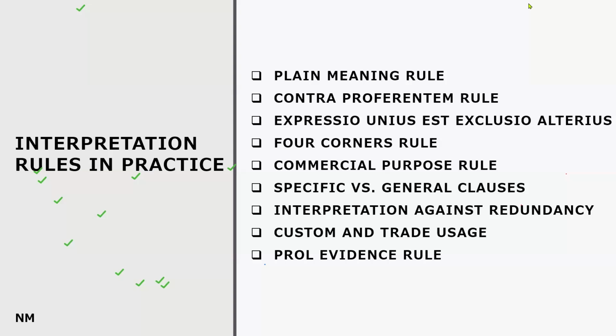So this is a very strong rule we see from the case laws, which is in practice as well. So if the situation or the ambiguity happened because of the default of the contract document itself, which is drafted by the employer most of the time, it should be resolved against the drafter, that means the employer. That is the meaning of the contra proferentem rule.